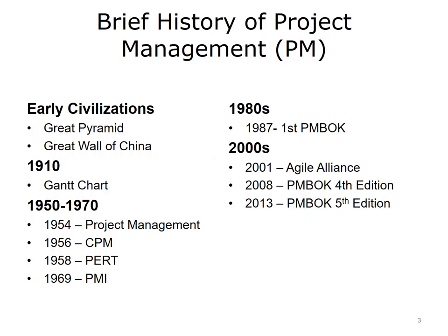In the same year, the U.S. Navy created the Program Evaluation and Review Technique, or PERT, to help manage its Polaris Missile Submarine Program. Around the same time, the DuPont Corporation developed its Critical Path Method, usually referred to as CPM, as a project management tool for scheduling various processes or activities. Eventually, PERT was adapted to employ a Work Breakdown Structure, or WBS, which we discuss in other units of this course.